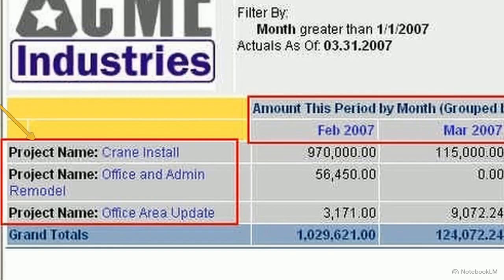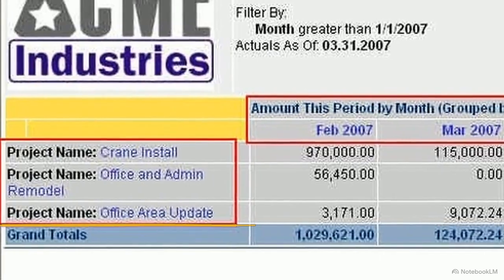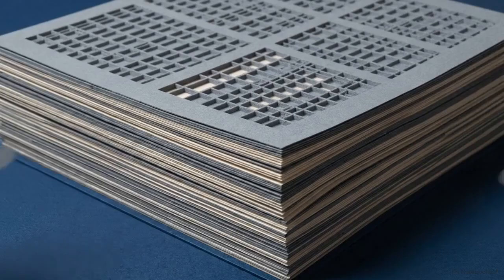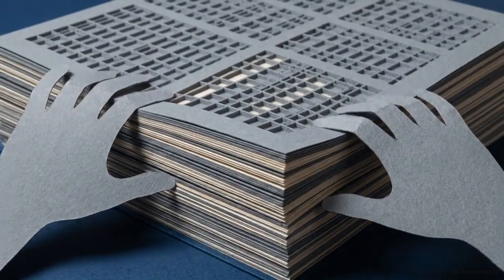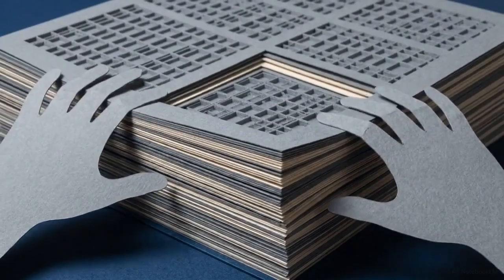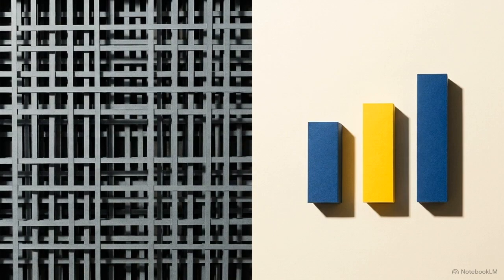To predict spend, cash flow reports display project rows against monthly column totals. This insight projects expected cash outflows across a 12-month horizon. But these projections instantly fail if underlying budgets aren't strictly maintained by project managers. While these massive matrix reports generate heavy analytical intelligence, their dense tabular format is extremely hard to read quickly. That friction is exactly what dashboards are designed to solve.